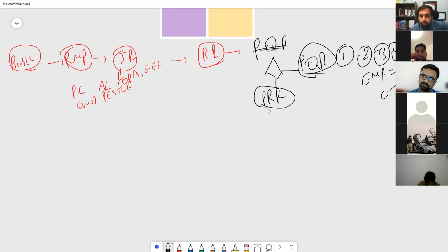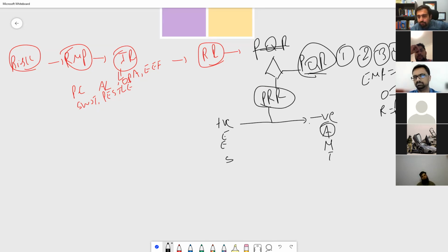So in plan risk response, we take the risk both as positive risk and negative risk. For negative risk, we know that risk is probability into impact. We have avoid, we have mitigate, transfer. For positive risk, we have exploit, enhance, share. So avoid is basically we don't do something at all. Probability becomes zero, zero multiply anything. So we don't do that. We don't do the project.